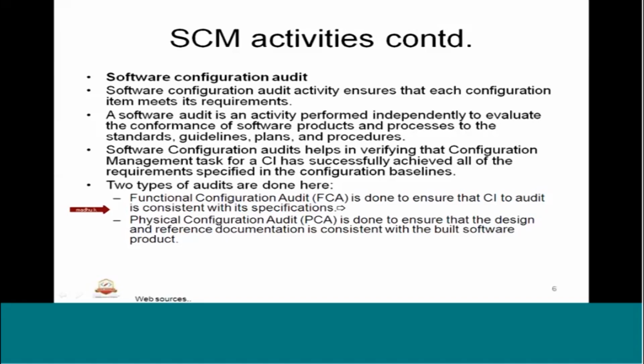Okay, the next one is physical configuration audit. This is basically done to ensure that the design and reference documentation is consistent with the built software product. That means whatever we eventually build, test, and deliver is consistent, again and again, with the changes and the configuration that we have in the configuration repository.